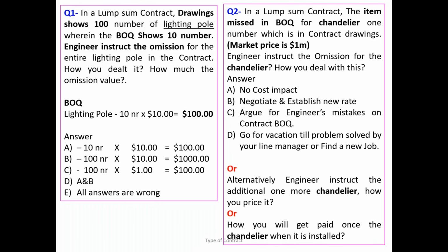Many projects, believe it or not, the BOQ is missing an item, and either the contractor says it's a variation, or the employer will come and say, okay, it is zero cost. Actually, it's deemed to be included. You have to be very clever when it comes to that unnecessary dispute. Anything that goes beyond the contract, which is additional works, the contractor is not bound by any rates because he is bound by the original scope and the original price.